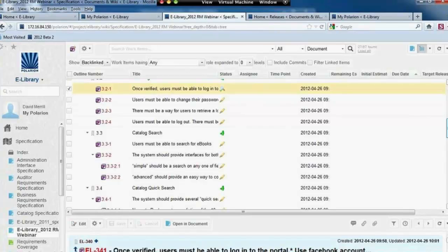Here in this window, I still have the severity and the status, which we saw before, but now I can do things like make assignments. I'll assign it to David Merrill. If I think that I want to be able to estimate how long it will take to fulfill this requirement, I can enter that data in here as well. I can also assign it to specific releases, that this will be a release 1.0 requirement. And beyond description, I have some extra ability to enter in comments.